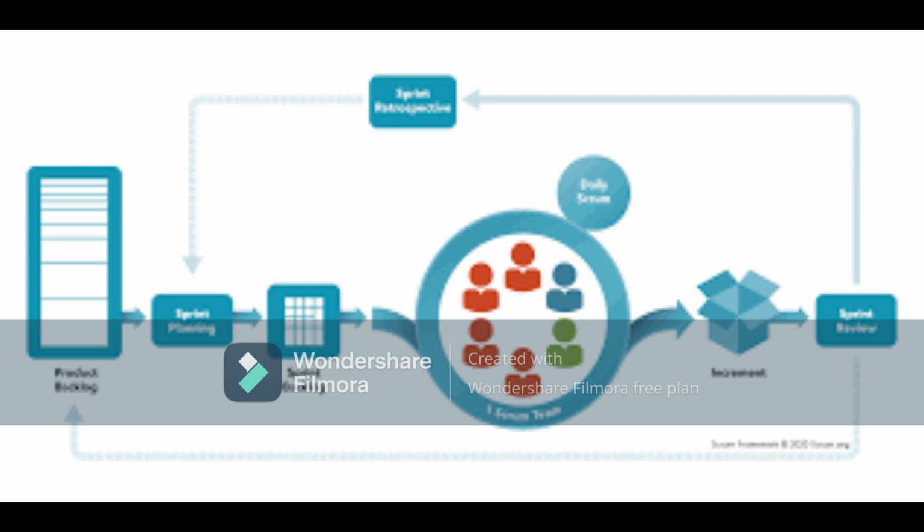A common mistake of agile teams that previously worked with waterfall is that they only divide the development phase into 2 week sprints, leaving out the rest of the phases and wasting all the benefits agile offers. Therefore, when updating or migrating methodologies from waterfall to agile, it is essential to forget about the phases and focus on the practice that agile inspires.